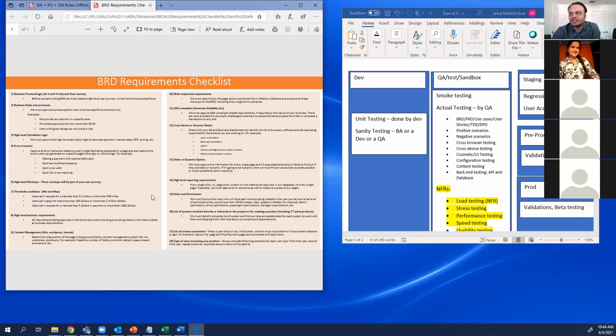It's pretty extensive testing, right? That's what the testers are going to do. That's why you need to be involved with them, and there will be a meeting on a daily basis or every few days, which is called a defect review meeting. When testers find defects, they log the defects in a tool called Quality Center.